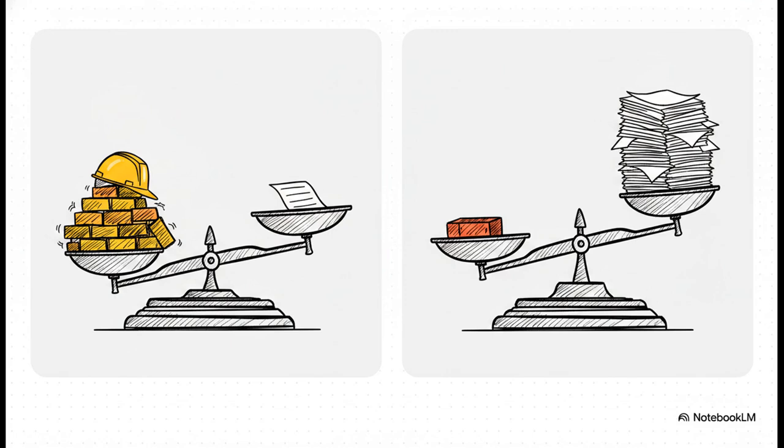Now think of the billing dynamic like a giant set of scales. On one side, we've got underbilling. This happens when your team has put in the hard yards, the materials are installed, but hey, the progress claim hasn't actually gone out yet. You've earned more than you've claimed. That makes this an asset because the client owes you for that work.